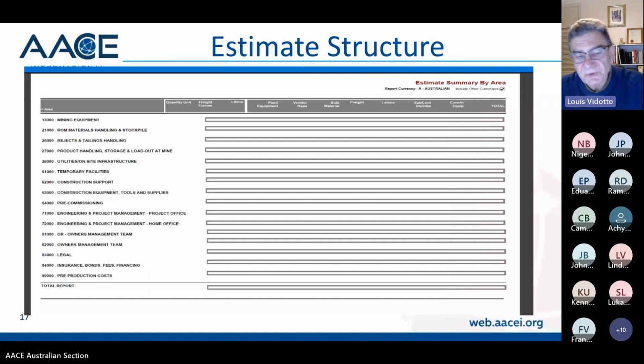So what that does is gives you a bit more certainty in the estimating process, but it takes longer. So depending on what the strategy needs to be, you might want to go on your 30% engineered, or 35% engineered, or go up to 50 or 60%. Now, during execution phase, when your engineering's at about 60 to 70% complete, in my experience, it's time to sit back and get a quantity dump on the project and re-estimate the job. From that point in time, you should be fairly sure that you know what the costs are going to be for the project, unless there's stuff that's still in the woodwork for claims and things like that. Maybe some things that haven't reared their ugly head on the site yet.